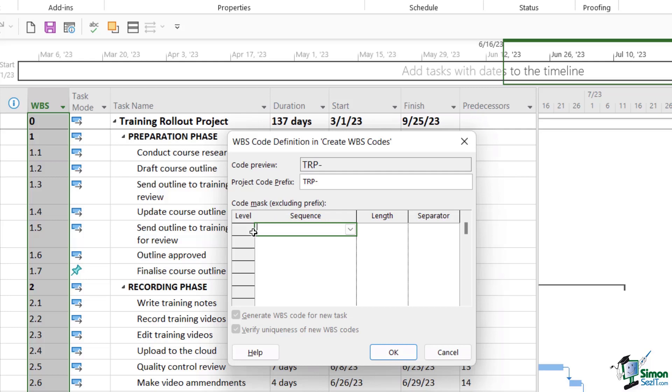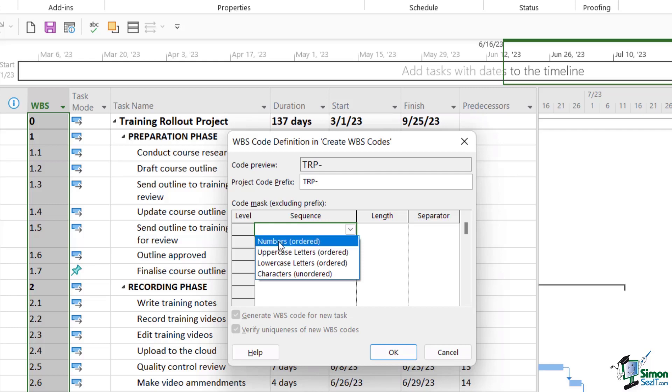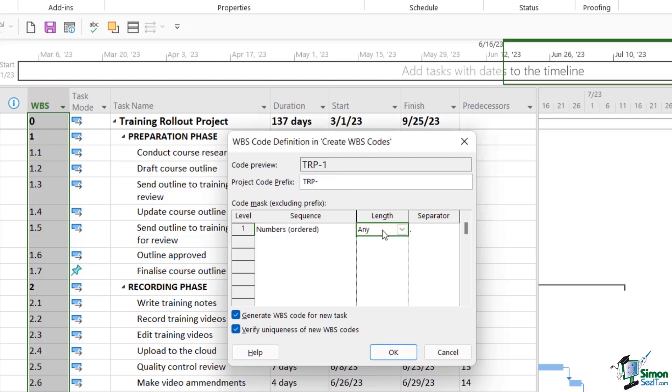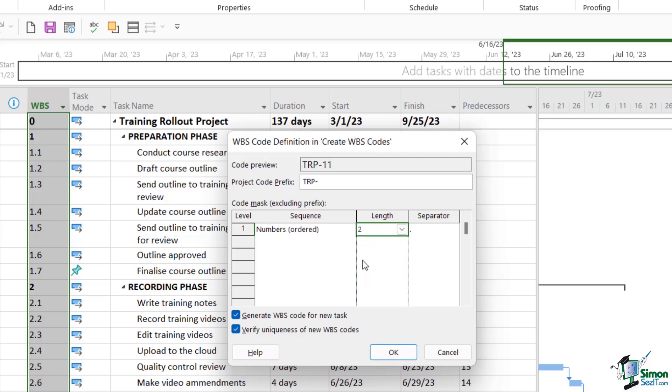So now in this code mask area we can define the numbering sequence that we want to use for our unique codes, and this first one is the top level. So if we click the drop down just here we can choose what we want it to display. So I'm going to say numbers, and you'll see as I select these we get a code preview at the top. So if I was to click on OK just here, my tasks are going to be numbered TRP1, TRP2, TRP3, so on and so forth. In the length column I can place a limit on the number of characters, so if I was to select two just here it means the numbers are going to run from 0 to 99. And I'm going to leave my separator as a period.